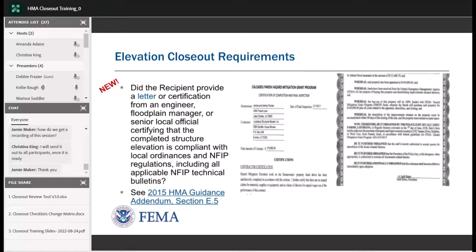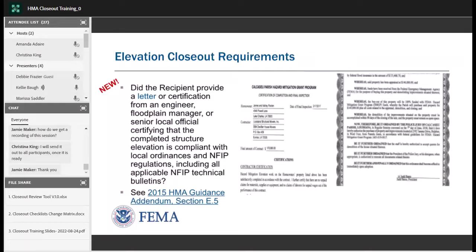A physical inspection sheet for each property must be conducted to verify there are no physical incumbrances to the property — a site survey may be necessary to clearly establish property boundaries. For F11: if pre-event market value was used, did the recipient consider the duplication of benefits in the purchase price and valuation methodology? The pre-event value should be notated in the closeout packet; if used, duplication of benefits should be notated as complete, with any duplicated benefits subtracted from the cost of the acquisition.